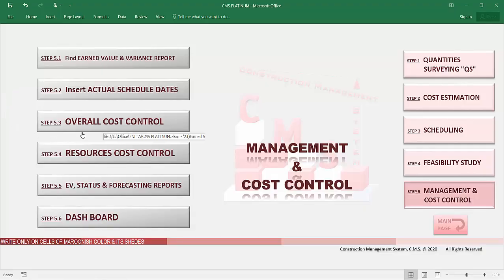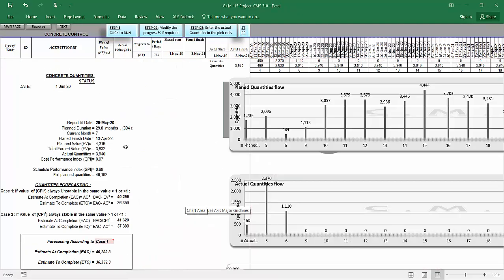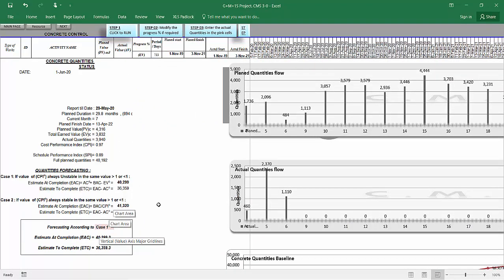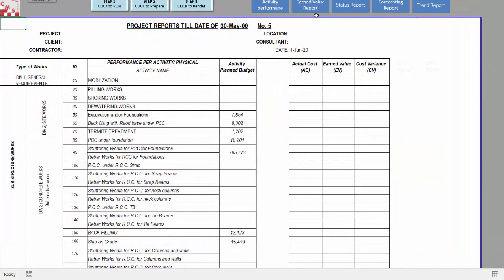CMS makes an overall cost control for the project, showing the financial status — whether over budget or within budget. The same applies for resources: materials or manpower. CMS monitors and controls consumption of materials like concrete, steel, blocks, block mortar, tiles, plaster mortar, cement, and sand. CMS also controls manpower — are we using the planned manpower or not — because CMS has a baseline for each resource, enabling monitoring of resource consumption performance and generating a performance report for each resource.